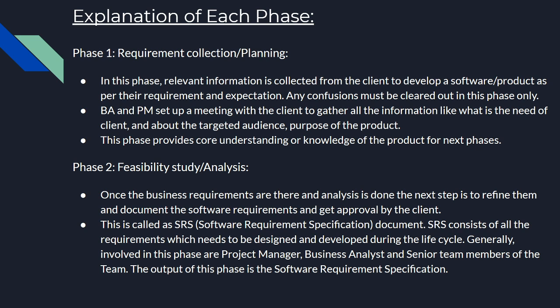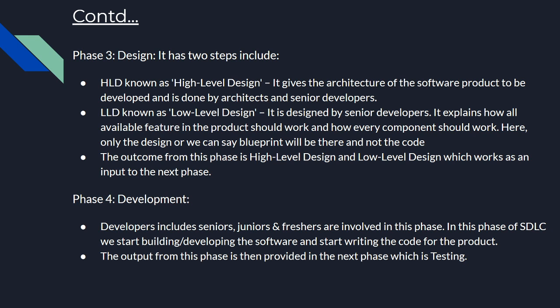Once the business requirements are gathered, the next step is to refine and document them to get approval from the client. This document is called the Software Requirement Specification, or SRS. The SRS is a document that consists of all the requirements which need to be designed and developed during the life cycle of the software. The Project Manager, Business Analyst, and other senior team members are involved in this phase, and the output feeds into the next phase — Designing.